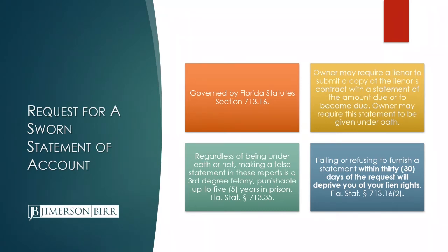Obviously, if you get it, you need to be honest with the information that you put in it, because there are criminal repercussions for not being honest in filling out that document. And failing or refusing to provide the information within 30 days will deprive you of your lien rights. So if you get that request for sworn statement of account, make sure you fill it out, or have the appropriate people fill it out. Make sure you respond to it timely, or your lien rights will be gone.